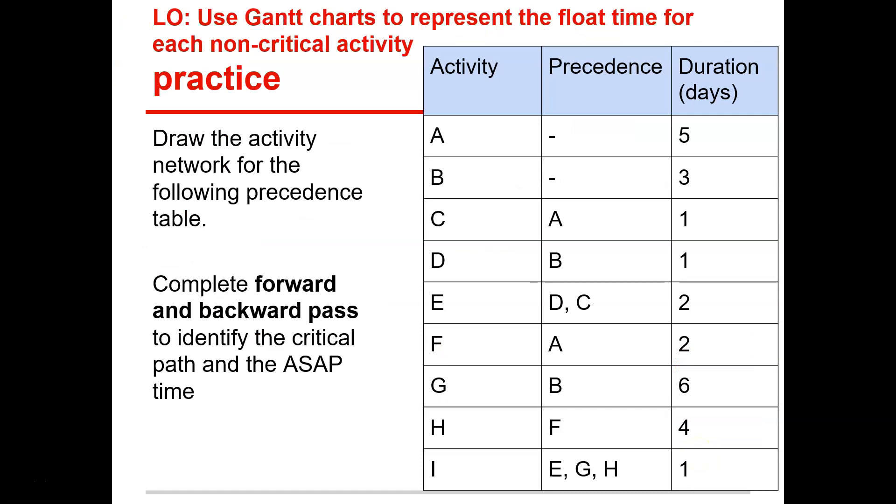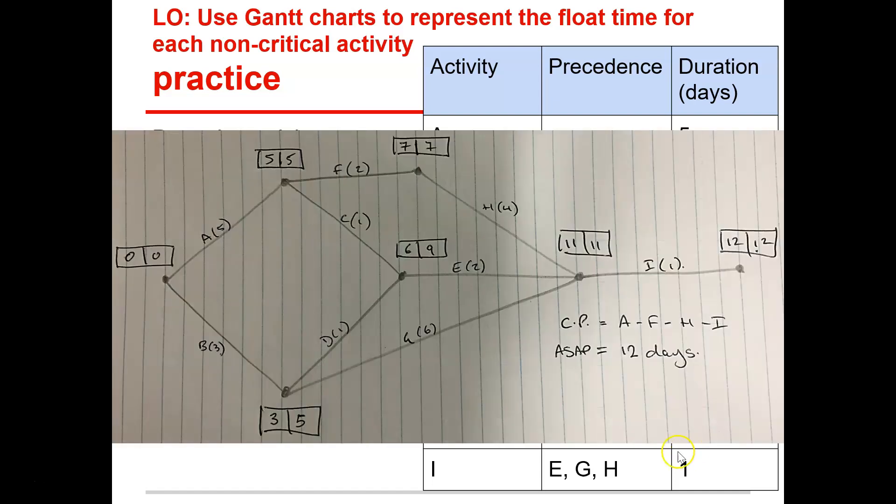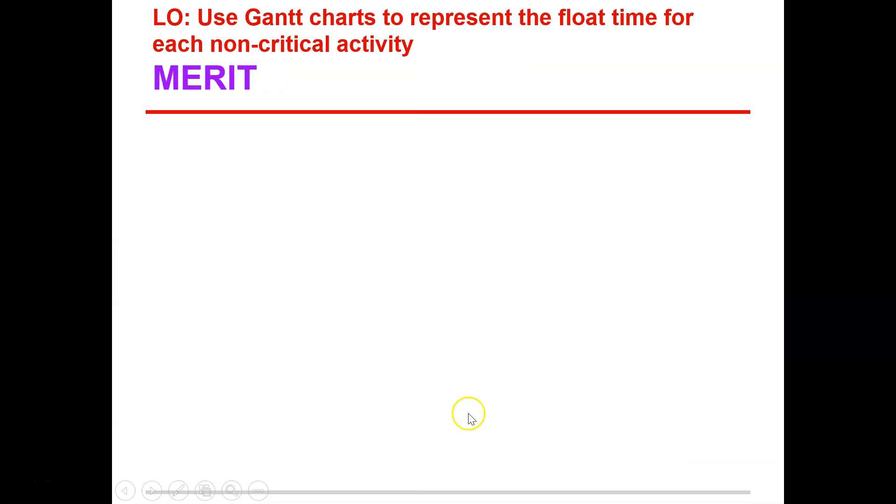Alright, and here's going to be another example. Have a go at this one. Pause the video. Have a go. Come back to the solution, which is this. And your network should look similar to this with your forwards and backwards giving you this and giving you the critical path of A, F, H and I with the ASAP time of 12 days. Again, if this critical path was any of these activities were delayed, the whole project would be delayed. Alright, this will be next video.